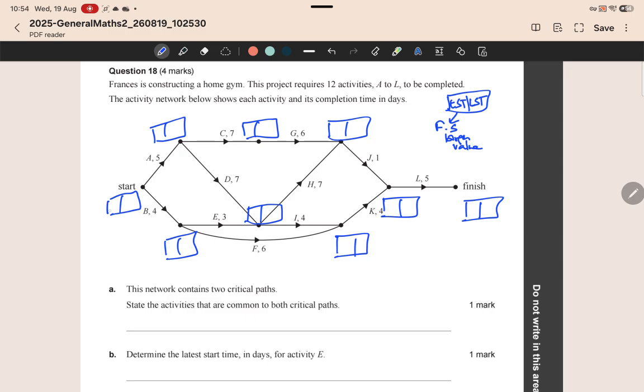Okay. So the procedure is that we start with a 0 because the activities haven't started yet, and then it takes 5 days for A. You could go either along A or B. Now, in doing a forward scan, I indicate where two edges meet because we're going forward, and any vertex which brings more than one edge to it is marked. So that's 2 here, that's 2 here, that's 2 coming here, that's 2 coming here. Now these are the places you have to be careful in doing a forward scan.